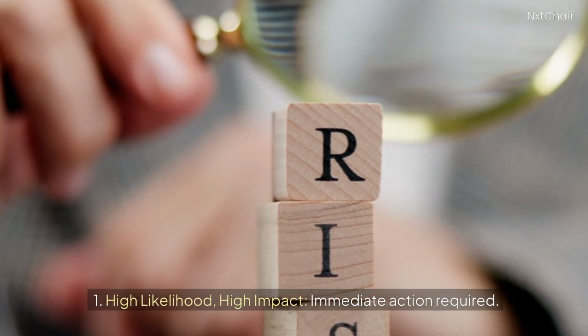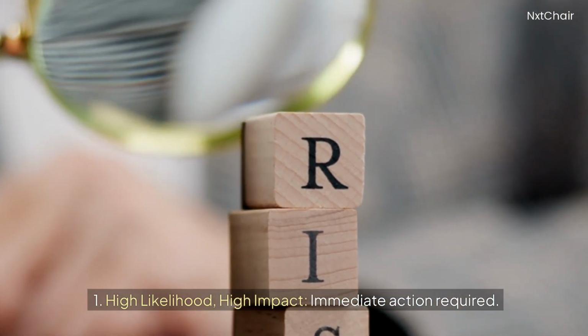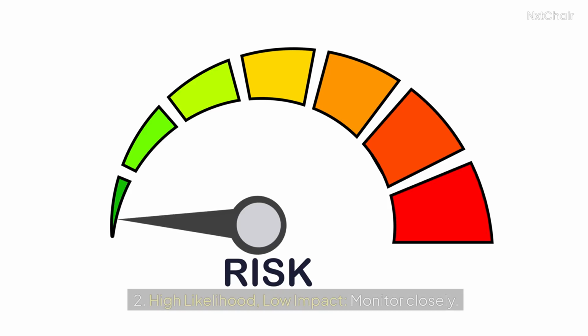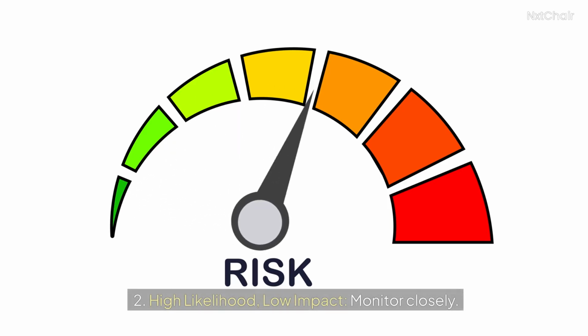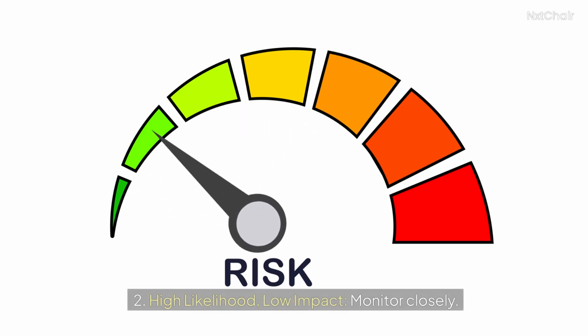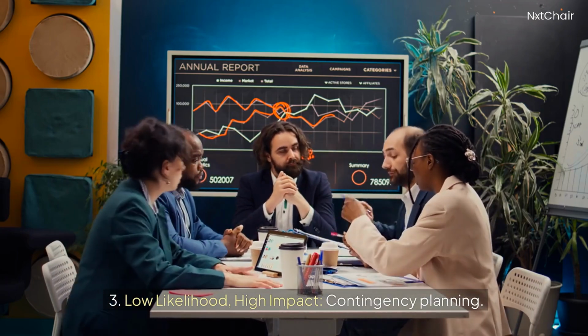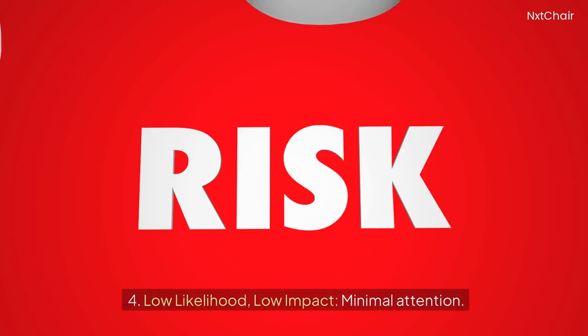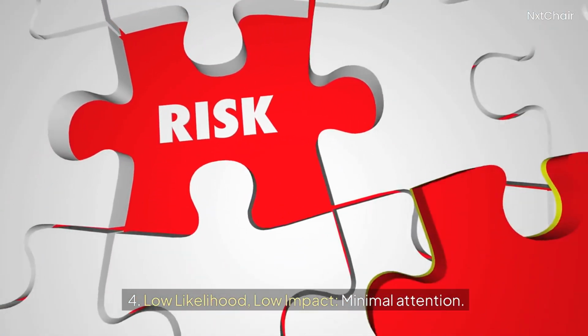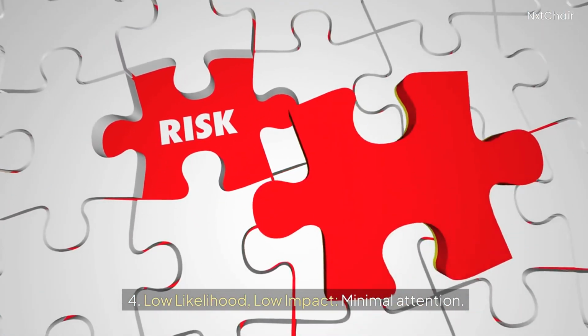1. High likelihood, high impact, immediate action required. 2. High likelihood, low impact, monitor closely. 3. Low likelihood, high impact, contingency planning. 4. Low likelihood, low impact, minimal attention.